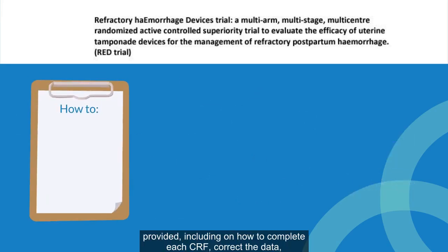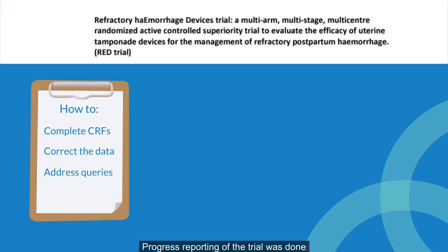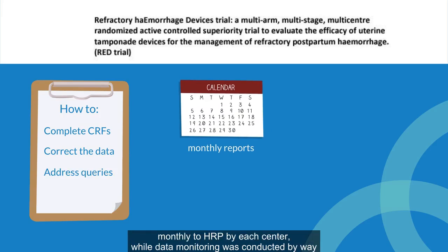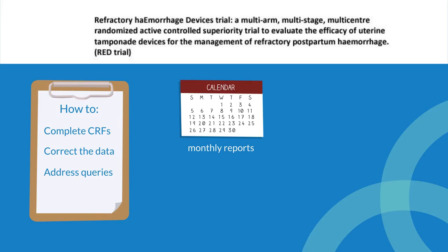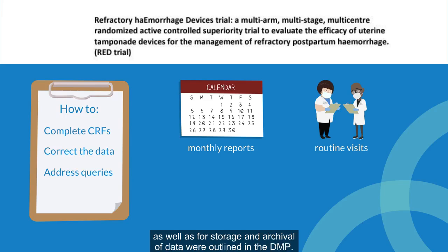Guidelines with instructions were provided, including on how to complete each CRF, correct the data entered in CRFs, and address queries raised in the OpenClinica system. Progress reporting of the trial was done monthly to HRP by each center, while data monitoring was conducted by way of routine visits by the HRP study team and/or external monitors. Finally, instructions for maintaining security and confidentiality, as well as for storage and archival of data, were outlined in the DMP.